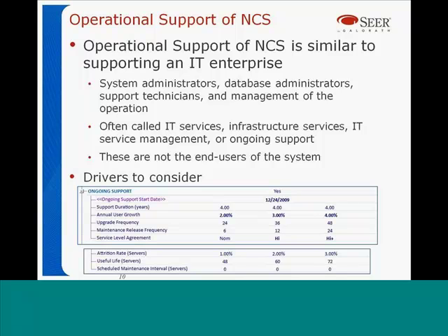Obviously, if it's super critical, can't have any downtime, you need some of the highest level support to turn around issues and problems very rapidly. If it's not so critical, you don't need to give it quite as much attention. Now, also for hardware types of things, we also look at attrition rate, useful life. How often do you replace a PC or a server, as well as how often do you do any kind of scheduled maintenance.